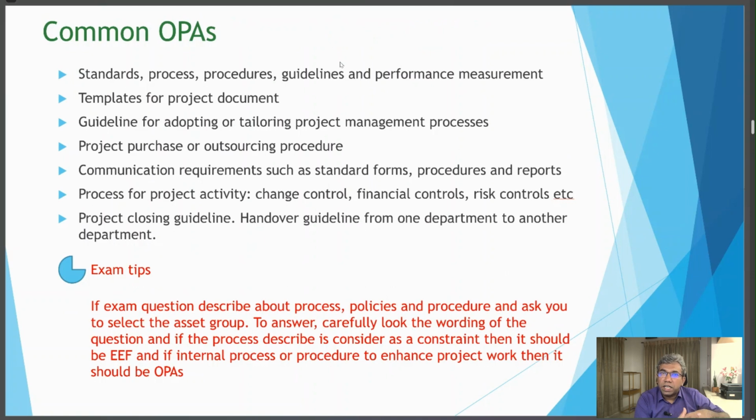It may have standard templates. It may have forms and procedures so that you can apply for your expenses as well. Okay, so these are very common OPAs. But just to recall, if someone asks you to distinguish between EEF and OPA, remember one thing: EEFs normally create constraints for your project, while OPAs normally enhance your project activities. Please remember this as well.